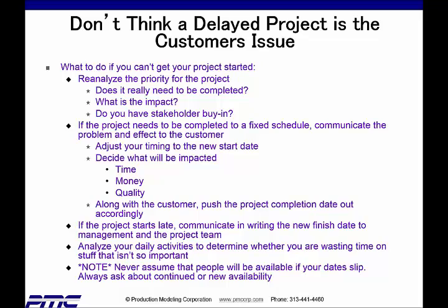Decide what will be impacted. Time, money, or quality is always going to be one of the three. Along with the customer, push the project completion date out accordingly. You can't compress the date. If the project starts late, communicate it in writing with the new finish date to the management and the project team.